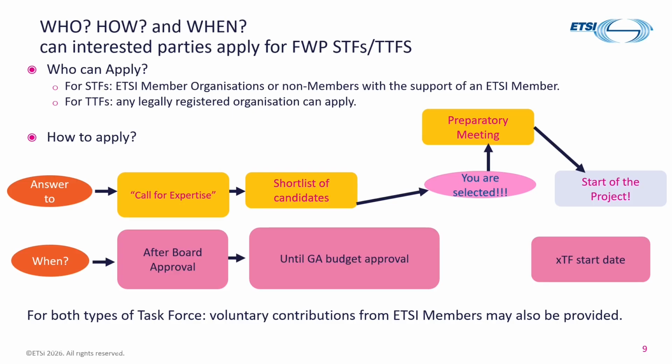If your organization is selected, the next step is a preparatory meeting. At this stage, the ETSI Secretariat invites all the selected experts together with the reference body chair. During this meeting, the draft work plan and resource allocation are defined. It is also an opportunity to cover contractual arrangements and to explain the full support provided by the ETSI Secretariat throughout the lifetime of the STF or TTF. In both cases, voluntary contributions from ETSI members may also be included.